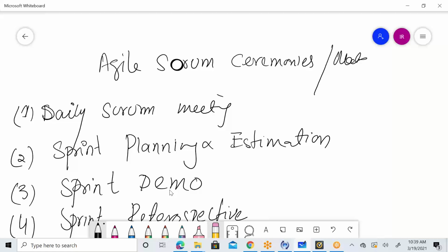And as a business analyst, your work is to gather requirements in the form of user stories and put those user stories into the product backlog. User stories are initially only one-liners, which define three things: role, function, and benefit. These one-liner user stories then need to be worked on properly so that you can change these tickets into proper user story specification documents. And these user story specification documents will be attached to each ticket, to each user story.